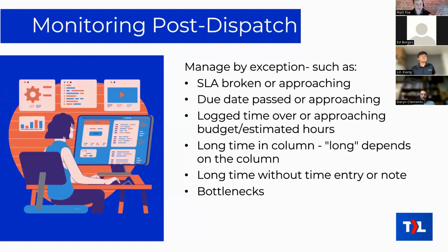But the rest of the system, on either side of this constraint, has a higher capacity. As the traffic or work flows through the system, it gets to this one spot, and the capacity of that one spot is smaller than the rest, and so that determines the highest possible velocity of the system as a whole. So that's called the bottleneck.